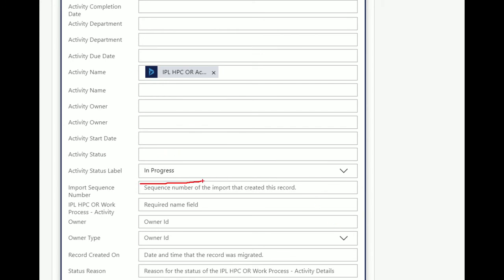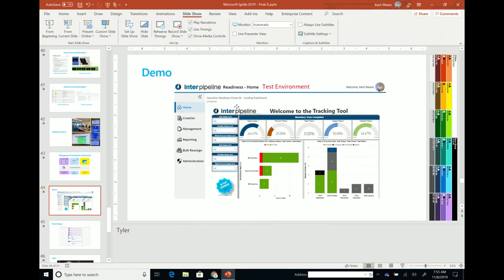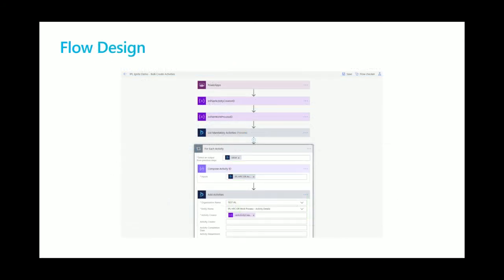The other thing that this does is it starts the clock. When someone clicks the button, leadership knows that people are on it and they can now start trending. We did this very deliberately to ensure that we could see when people had started, because if someone doesn't start something, it may not show up in the dashboard because it doesn't exist. And this will be the way we drive consistency in the org as well, that this is the tool that we will manage our progression through the management framework with. And if you're not using this tool, you're not progressing. So you shall, you must, you will use this tool.